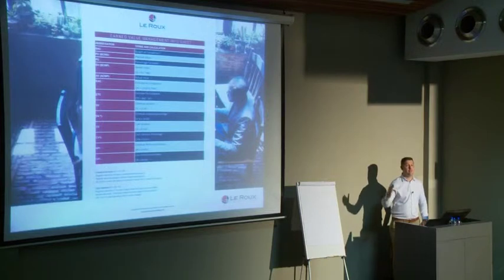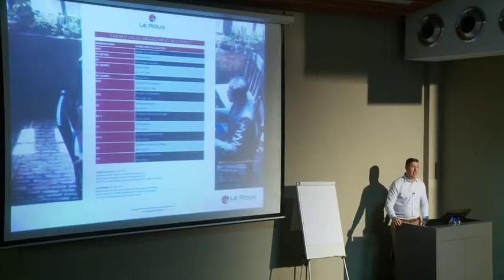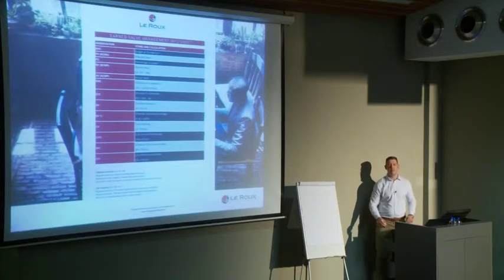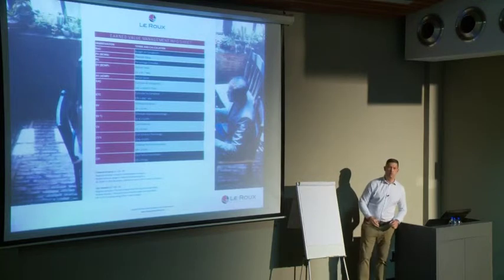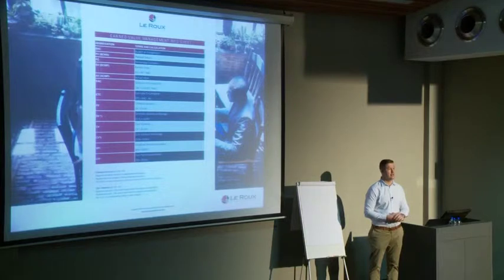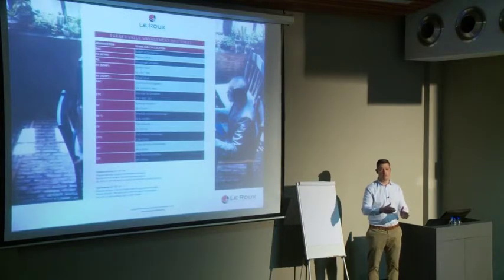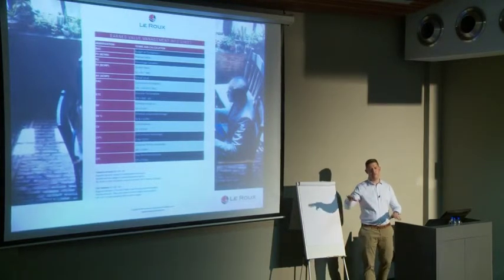What would be the budget at completion of our development project? 500,000, very simple. Then we have planned value. What would be the planned value for month 1 in our project? 800 hours multiplied by 125, it's about 100,000 a month. So planned value, month 1 would be 100,000, month 2, 200, 300, 400, 500. So I've made it very, very simple.